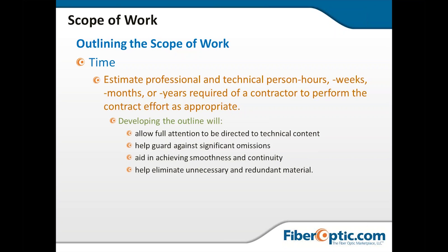Therefore, I can then calculate how many men I need to put on the project at any one time to back into that number and get it done in an appropriate amount of time. So understanding the technicians' hours and how to back into that. And that'll also make sure that you have the appropriate number of people on site to make it a successful project.